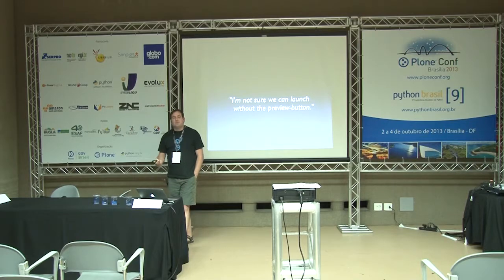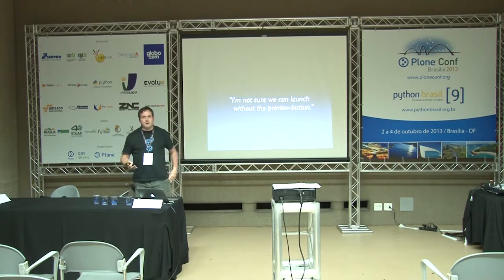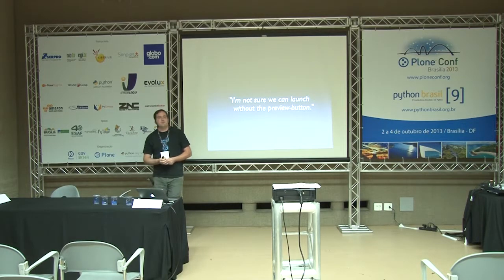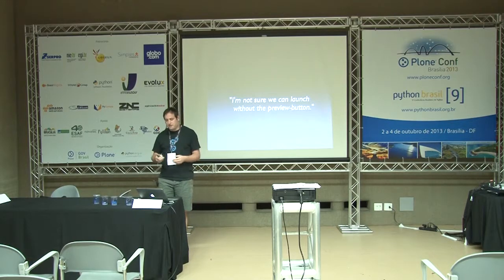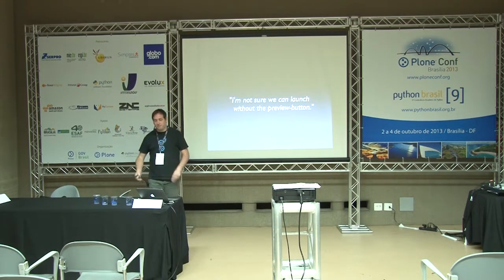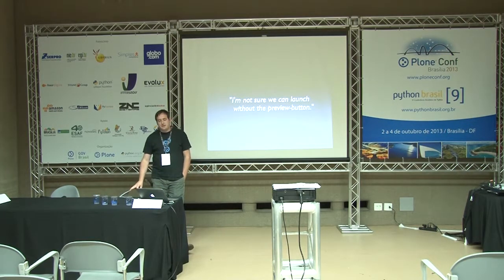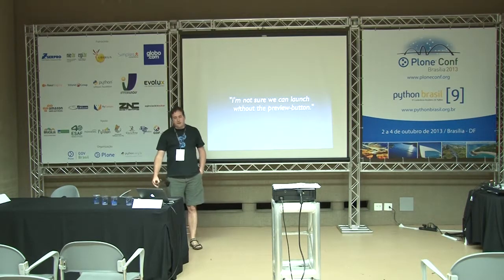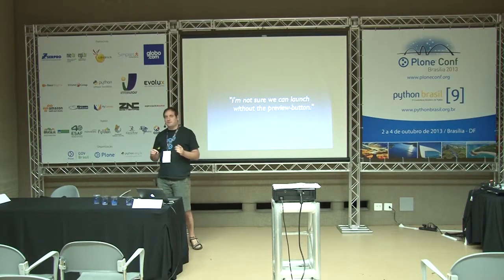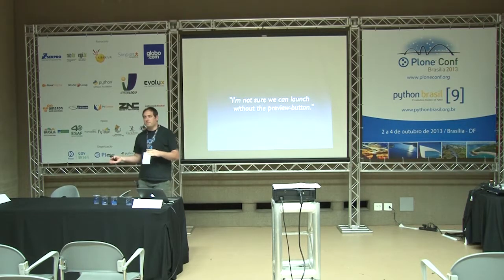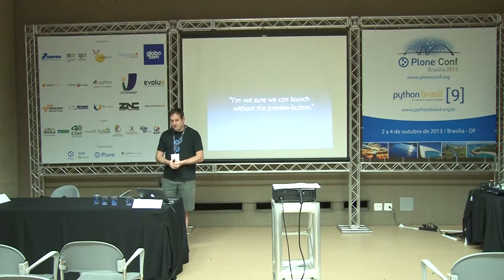So also, the new collections in Plone did not provoke moans of pleasure, but only ignorance. But there were moans of pain when they realized that the old advanced search form from Plone 3 was suddenly gone and replaced by something much more cool, from my point of view. So what went wrong with this project is that the customer and the intermediaries did not think about this project as a relaunch, but only as a version upgrade. And also the customer had no idea what's possible and wishful in the 21st century in an intranet, but that's nobody's fault.